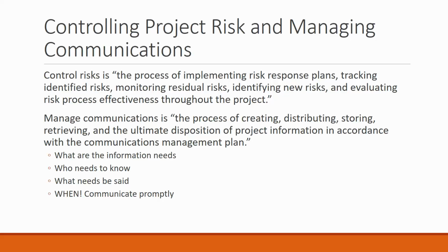We're constantly concerned about identifying new risks as well. We don't want to sit back and think that just because we did all this work with our risk management plan, those are the only risks that will ever come up and ever impact our project. Well, that we know just isn't true. So controlling the risks is a process of implementing risk response plans if needed, tracking the identified risks, monitoring residual risks, identifying new risks, and evaluating risk process effectiveness throughout the project.